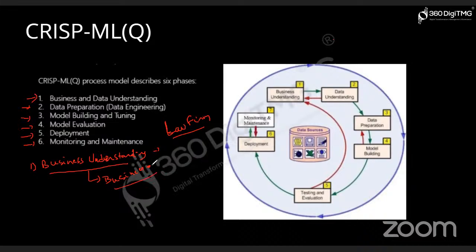Once we learn about this business, okay, then we'll have to prepare a document which will list out all the requirements of this project. So this document is known as the project charter. Okay, this is the first step.